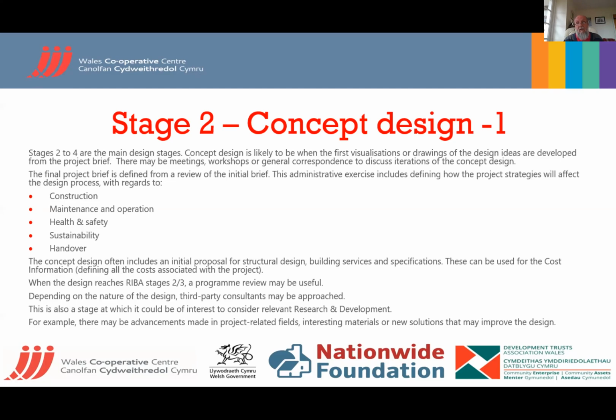And as you move through stages 2 and 3, you might like to rethink your time scale of how you want to do it. Generally, things take longer than you think they're going to take. And depending on the structure that you're choosing, it may be quicker to get timber frame up, but then it's more expensive, or not the skill set that people have got with brick and block, which can be affected by the weather. So we're going to think about it.